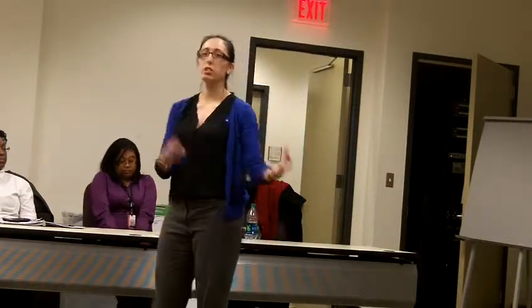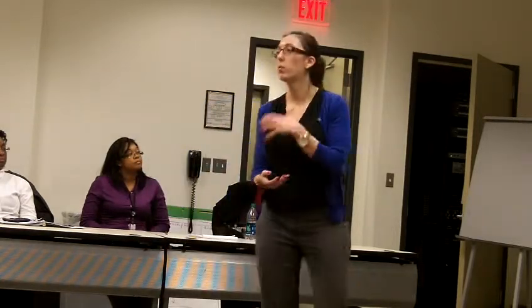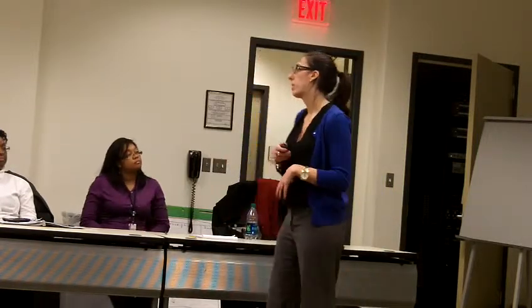So at the end of each sprint, it's nice to kind of look at what went well and what didn't go so well. And that leads us to our third and final stage of development, which is called the retrospective. This is where the whole team comes together, once again, and discuss any pain points they had. They think about what problems they faced. An important part is they also make suggestions about what they can do in the next iteration to kind of improve upon what happened previously.